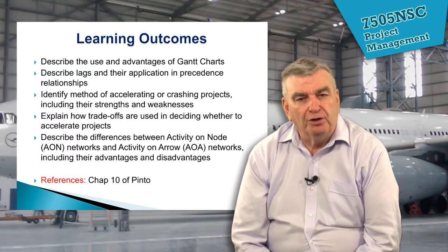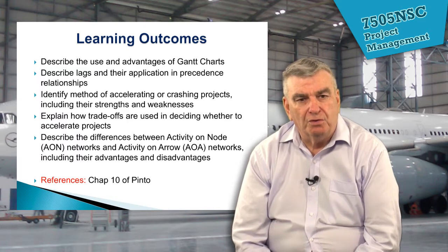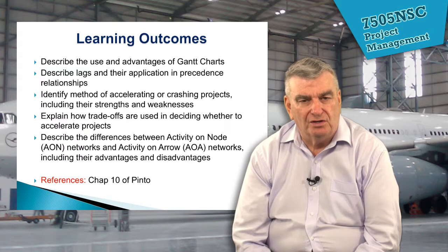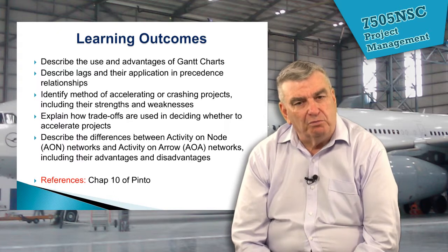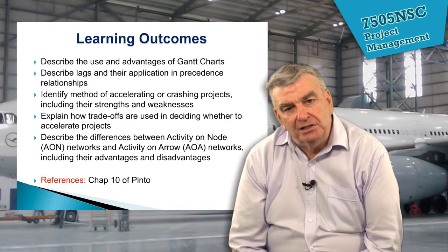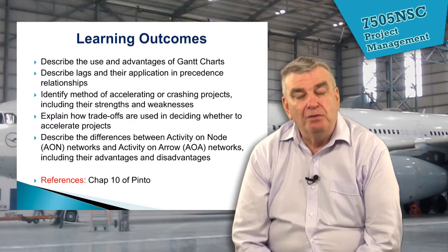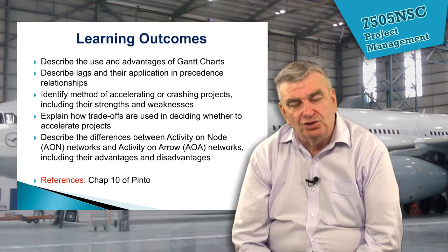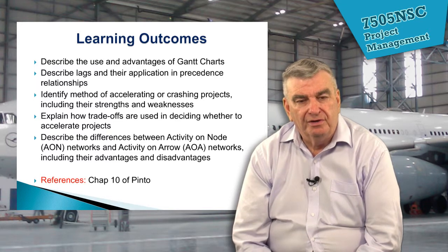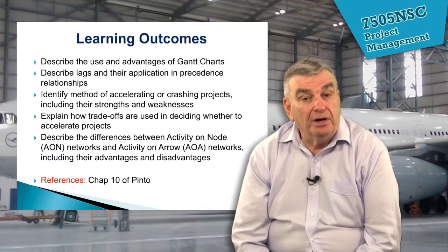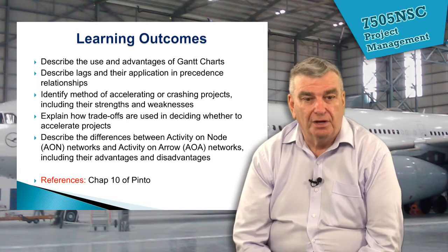We're going to be identifying the method of accelerating or crashing projects, including their strengths and weaknesses. And this is particularly important because it is not always bad that a project finishes late. That is, it may cost more to finish it on time in terms of paying overtime than paying the penalties of finishing late if there are penalties.